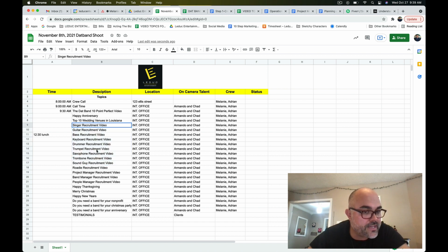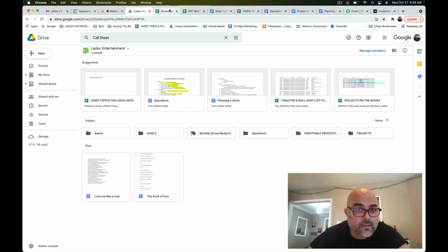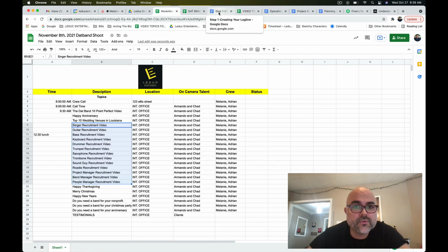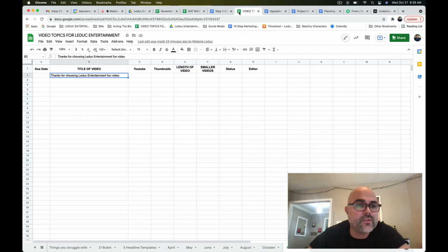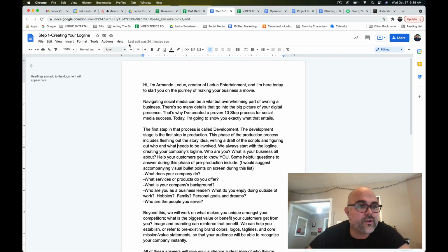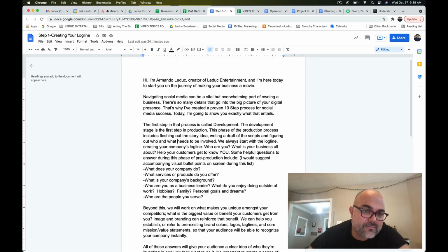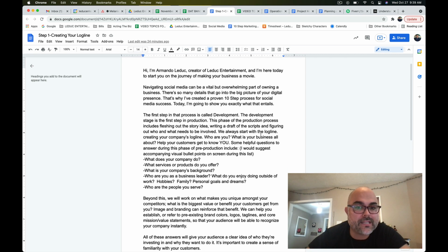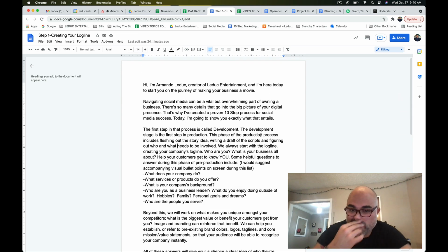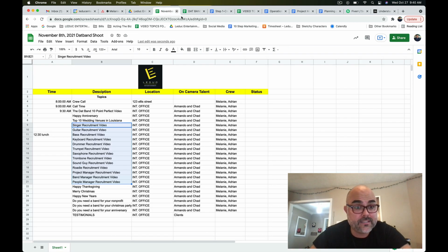So these videos right here, we know that they'll be fast. But your job, person watching this, is to know that each video, for instance this is a script right here. It's about a page and a quarter. This right here, if you're going to do 2 or 3 takes total, is probably going to take 20 to 30 minutes, depending on the actor, right? So keep that in mind when you're putting